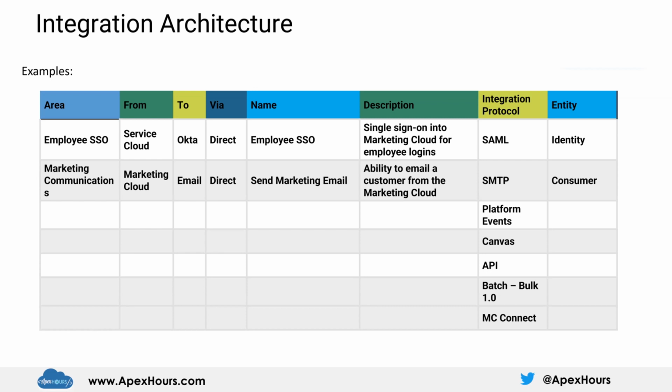List them. The reason the integration architecture is so vital is not only that the integration originates from Salesforce, but it also dictates the dependency on other systems and on other teams to do some integration-specific work to integrate with Salesforce. So it is really helpful to list down the dependencies, and at an earlier phase you can identify the risk of that particular dependency and highlight it to the project management. So it is very important. Also, from a project sizing point of view, it's very important to understand the integrations and the effort required to build them.